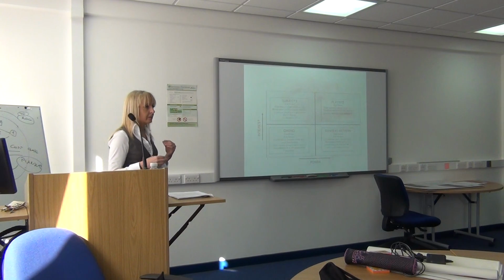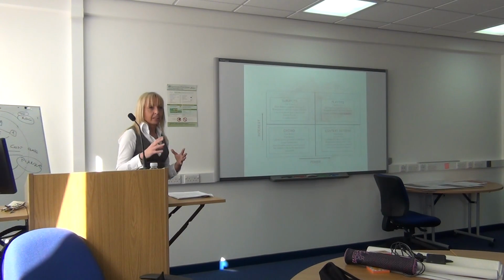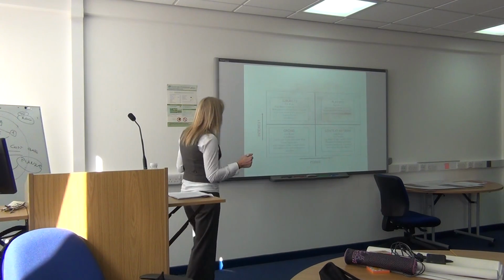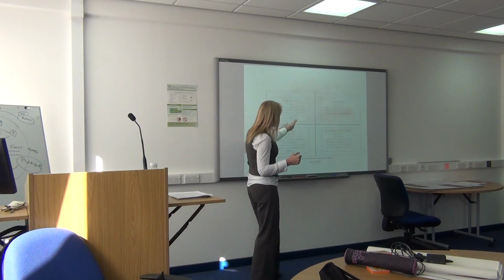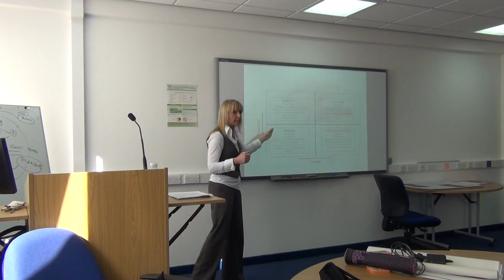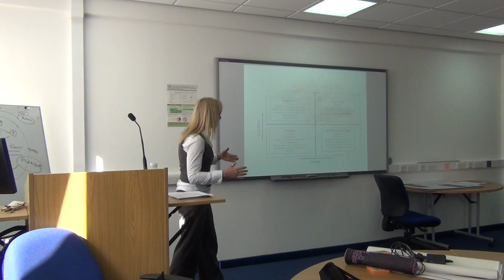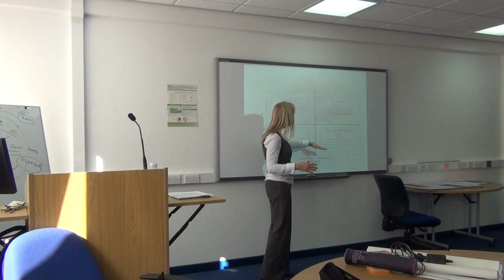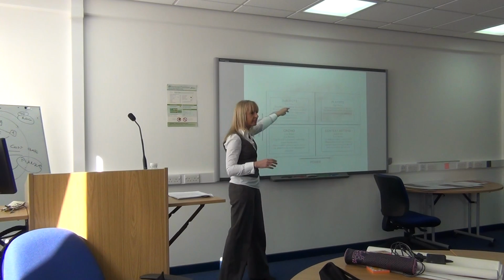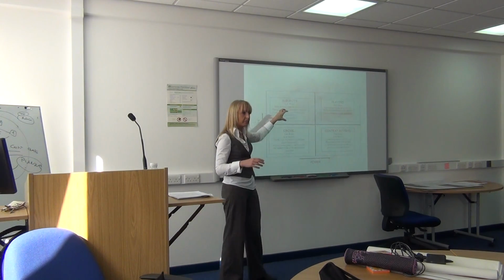So this is to be done twice actually. You identify your stakeholders, and then you plot how much power they have along this grid here. And then you do the same exercise and you plot them again on the interest, and then you draw a parallel to there. So there's a definitive spot in which they can be used.